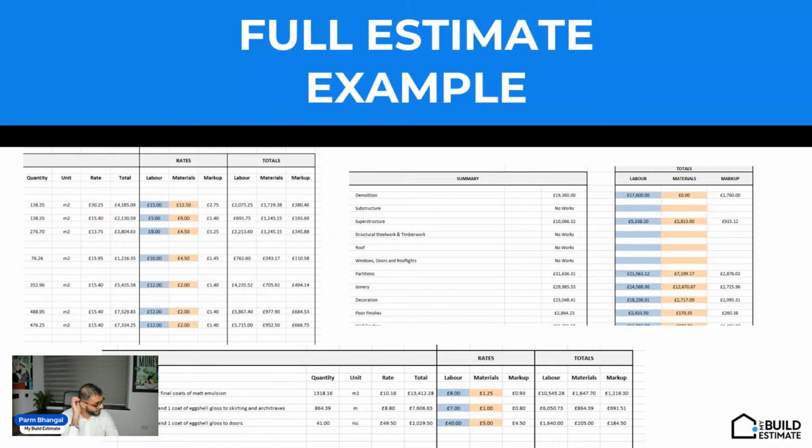You then step foot on site and you do, depending on your payment terms, fortnightly or monthly payments, whatever they might be, even weekly, depending on what you're doing. Every 2 weeks, you do a valuation. What value of works according to my estimate are complete to date, and what money have I spent? If it's in the black or it's in the red, you can make them adjustments. If you do not let them things happen and you don't take the time out to make them things happen, you are walking blindly to the end of the project, and you're never going to make any changes.